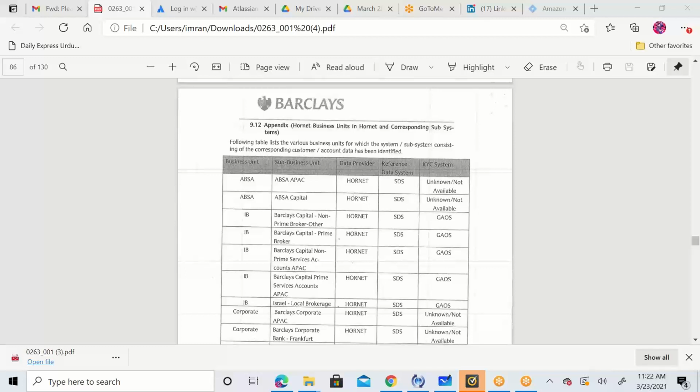The project management office's core responsibility is to come up with the risks, assumptions, dependencies, and constraints. They will always develop this document. It would be on PowerPoint. You can always get it from your project manager: I want to see your project charter document where you have mentioned the constraints, dependencies, assumptions, and all that. You simply need to take it from him and see if all these constraints are still there, because you don't want to copy paste everything. Maybe after a month or 2 months you will see there are no more constraints. You will take out those constraints. Usually there's no constraint in your project. If there's a constraint, that means you're not going anywhere.